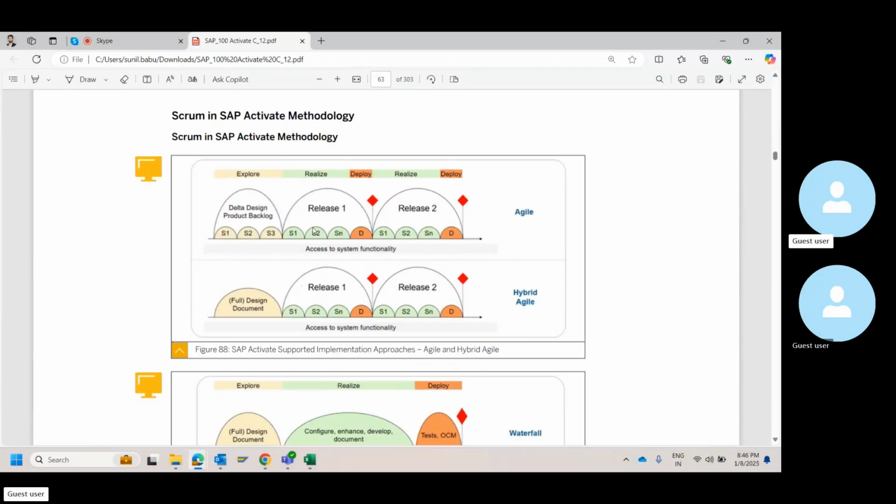There are 100 objects for Realize that the development team, the ABAP team, has to build. Now what happens is I can take it through sprints. How does this work? I have prioritized. There is MSCW. The must will be, let's say, 20, should will be 25, could would be 25, and won't would be 20. So this is the segregation that we have had. This is how we have selected the 100 objects.